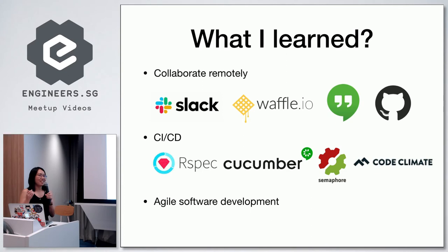Actually, I made a few mistakes when I did that. First of all, I'm not supposed to take more than one story at one time, and I was not aware of that. The people are very kind. They said, hey, why did this fellow again take two stories at one time? And they said, hey, Tong Wei, you shouldn't do this. You should finish it one by one. I said, okay, can I just remove my name there? And then, yeah, faster go and do.